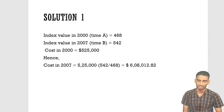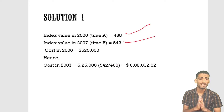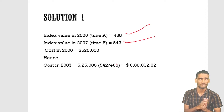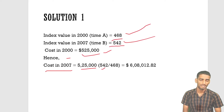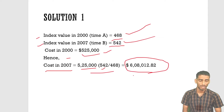For the solution: index value in 2000 (time A) = 468; index value in 2007 (time B) = 542; cost in 2000 = $525,000. Therefore, cost in 2007 = cost in 2000 × (index at time B / index at time A). After applying the cost index model formula and doing the calculation, you get the cost in 2007.